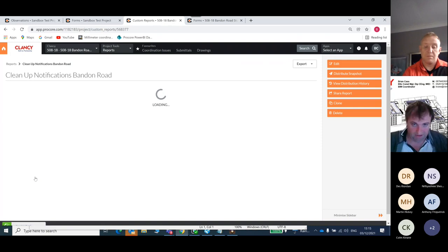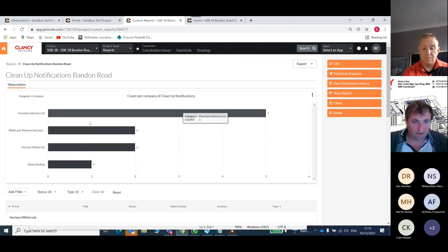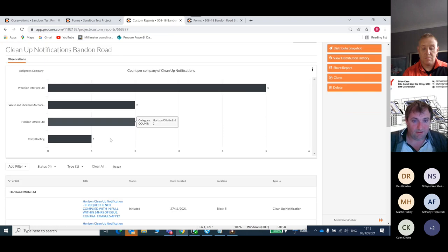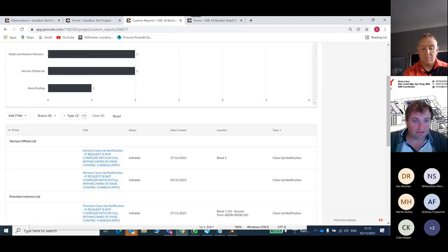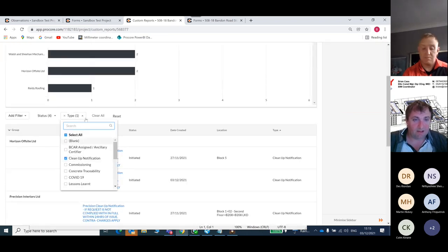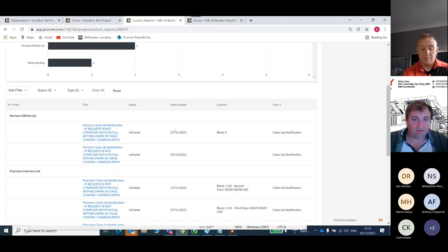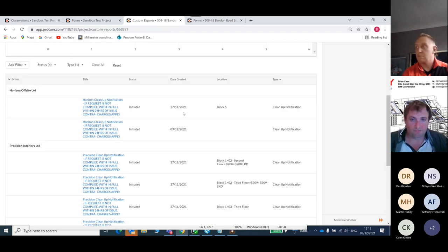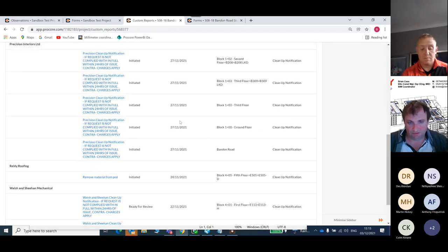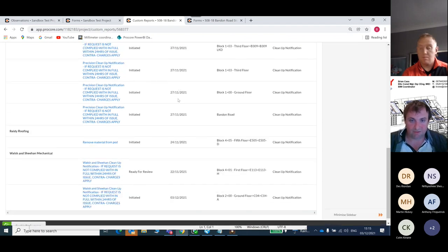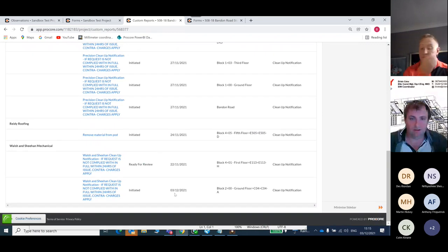This can be shared to the team or whatever, and it'll give a report of all the cleanup notifications that are currently not closed. Strictly speaking, if they're more than 24 hours old from when they were created, contract charges should apply. So these are all from last week, essentially, except for this one. This one is today, Walsh and Sheen.